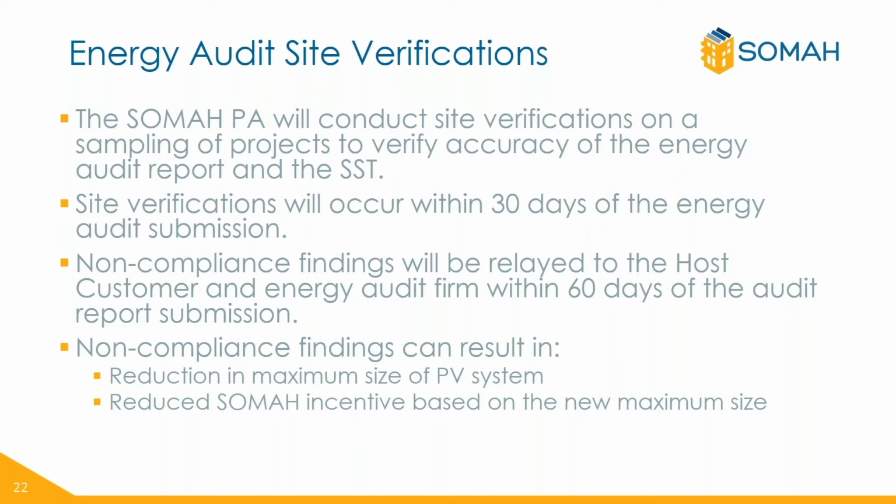And if there are repeated non-compliance findings from an individual contractor or firm across multiple projects, it will result in the contractor or firm being placed on a provisionary process for all submitted projects until the issue is corrected. And if these instances are deliberate, consequences can include infractions or disqualification from the program.